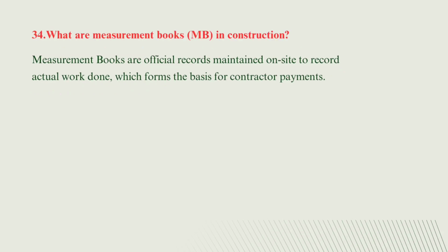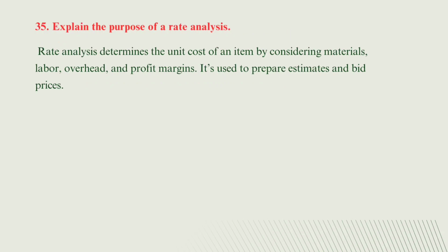Now the next is, what are the measurement books, that is MB in construction. Measurement books are the official records maintained on site to record the actual work done, which forms the basis for the contractor payments. Now the next question is, explain the purpose of rate analysis.